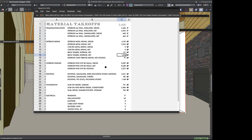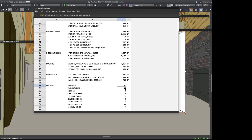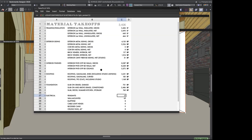I've also got my electrical fixtures — each of my wall-mounted lights, it's just counting the number of symbols with that name; counting the number of liptopars, counting the number of pendants, and so forth. So just by using wall styles, slabs, and roofs with the appropriate type of querying, I can start to build some material takeoffs and perhaps provide those to prospective trades or general contractors — do a stucco takeoff, a wood flooring takeoff. That can be very useful.